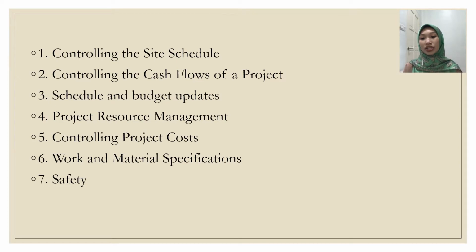All project activities that were scheduled in advance are used, and if the jobs are being performed by either too few or too many employees, it will cause problems. It is the project manager's obligation to level these resources out and keep a proper quantity of resources dedicated to the task. It is not cost effective to maintain more resources on hand. If they aren't going to be utilized again, remove them from the project.